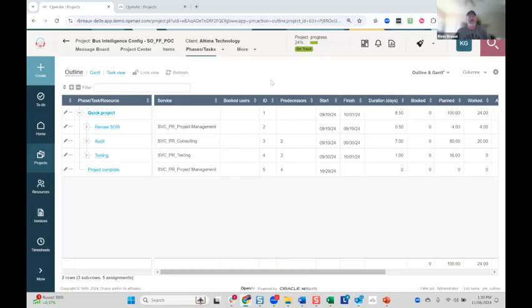So let's take a look at a few work breakdown structures that we often see. First off, we always recommend using templates when you're creating projects to be able to have templatized work breakdown structures that can be used over and over again, at least as a starting point. It allows you to basically start with the structure and then be able to amend it as needed, add or remove parts of the project as needed.